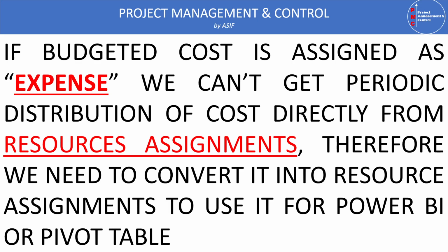So if the budgeted cost is assigned as expense, we cannot get periodic distribution of the cost directly from the resource assignment. Therefore, we need to convert our expenses into resource assignment so that we can use the data for our Power BI reports or in our pivot tables.